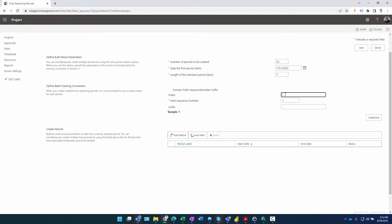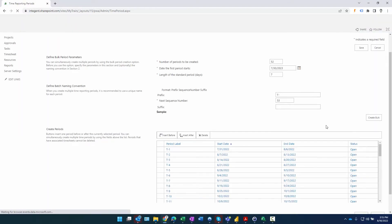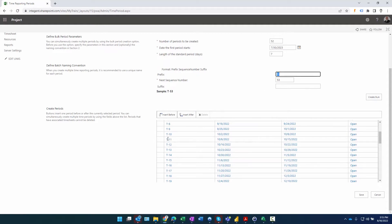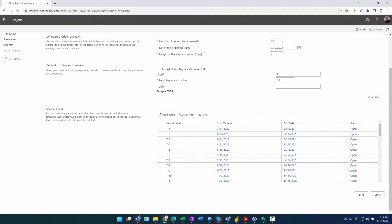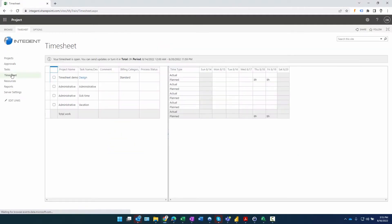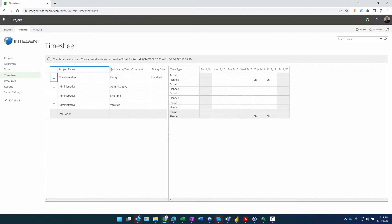The sequence number starts at one since there are no current timesheets. I'm adding a prefix - just 'T' so you can see what it looks like. If creating from the beginning of the year, you might use FY22 or FY23. With these settings, I'll create 52 time periods to take me through next year. Click 'Create Bulk' and that creates my timesheets - the T-dash prefix shows up. Periods run from 7/31 through 8/6. I'll click OK to save those settings.